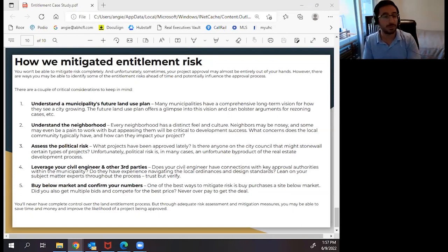There were instances where we had an original design for the first two parcels, and then we got the third and the fourth. That cost money for the architect. Change orders are very expensive. So by having a low basis and constantly updating your numbers, you can prevent yourself from having any additional risk. And make sure you get multiple bids. You want to get the best costs and never overpay for the deal. As long as you do that, you'll do okay.